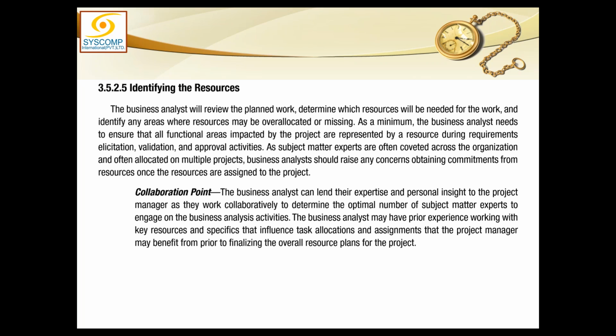As a minimum, the business analyst needs to ensure that all functional areas impacted by the project are represented by a resource during requirements elicitation, validation, and approval activities. So somebody must be assigned for that purpose, for all those jobs: requirements elicitation, validation, and approval activities.